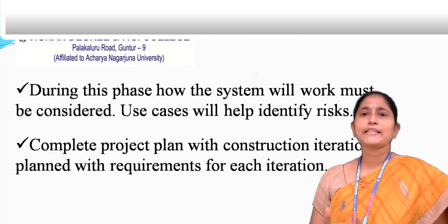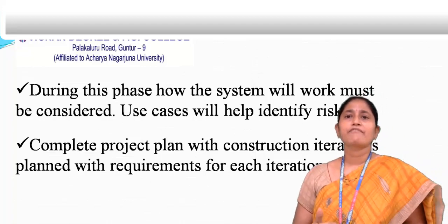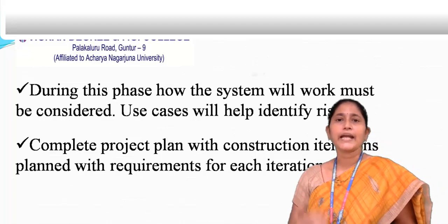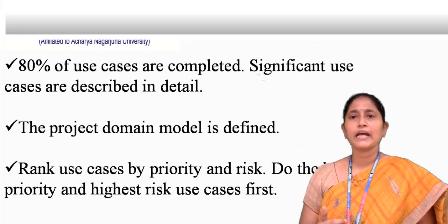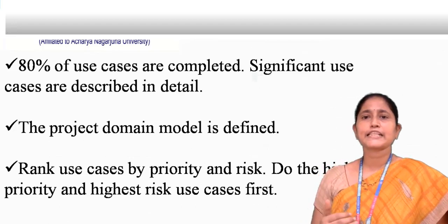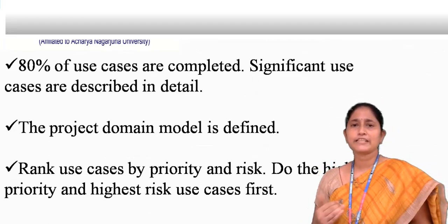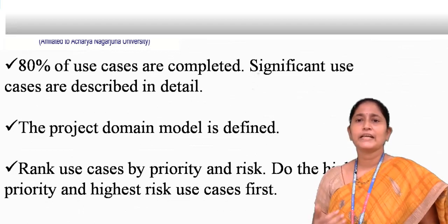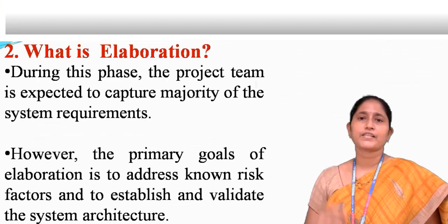Along this process, complete the project plan with construction iterations planned with the requirements for each iteration. Mostly 80% of use cases are completed and significant use cases are described in detail. The project domain model is defined and use cases are ranked by priority and risk — do the highest priority, highest risk use cases first.